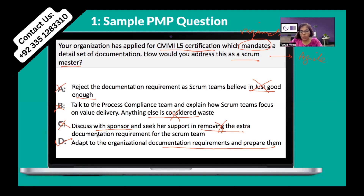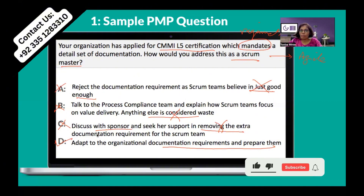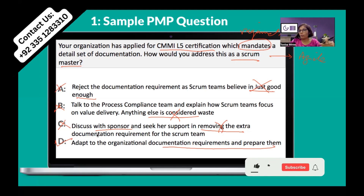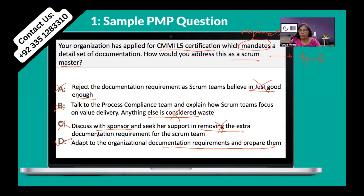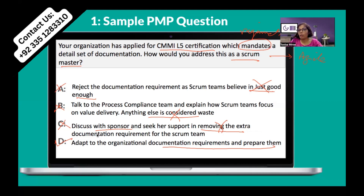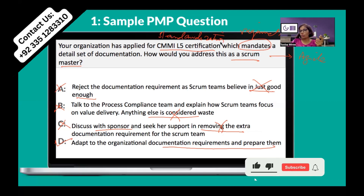Very well said. The only thing I want to add is: we have already talked about this when discussing the manifesto — Agile doesn't say you don't need documentation at all. Agile says only work on the artifacts, plans, documents, SOPs, templates, or checklists that you actually need and use them in your process. Don't just create and keep them in folders where nobody looks at them. In this question it is clearly stated that this is part of standardization — CMMI Level 5 is a standardization requirement.